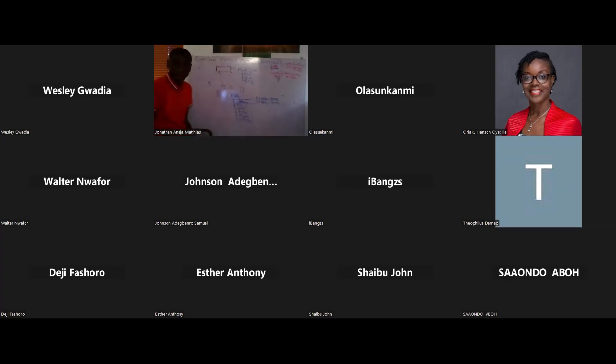It takes a lot more time, but what I'm doing now is bottom up. Block work, you can decide to use square area, you can decide to use units of block. Let's say I need 500 blocks on my foundation. I'm buying the block at 300 naira, plus I am laying the block, 500 blocks, I'm paying the mason 60 naira. You come with the cost of, let's say, 15,000 plus 30,000. You have your 45,000. You do that for each of the work packages, the subtasks.